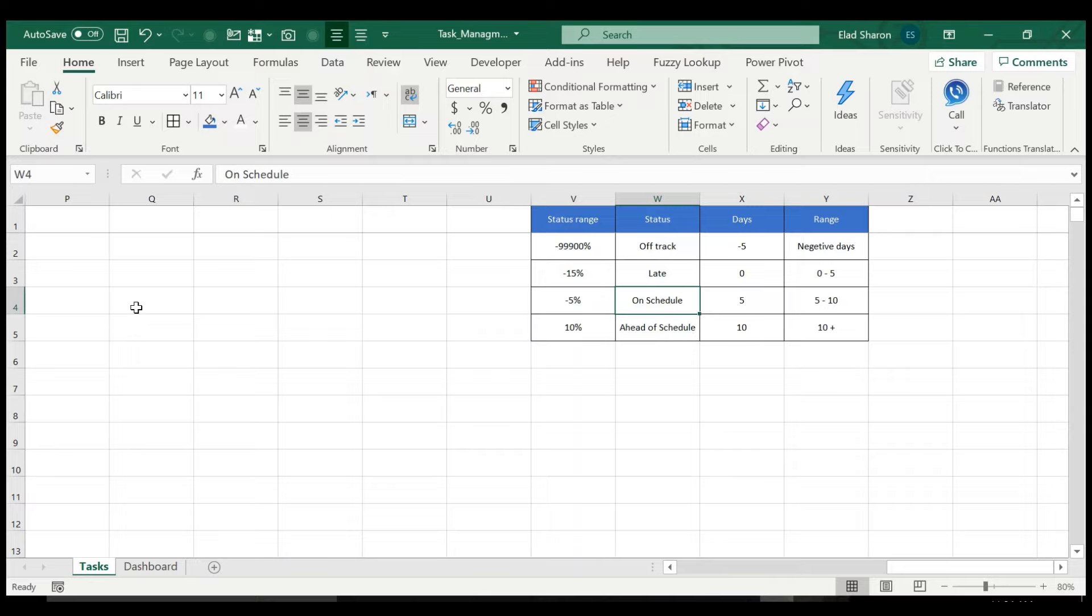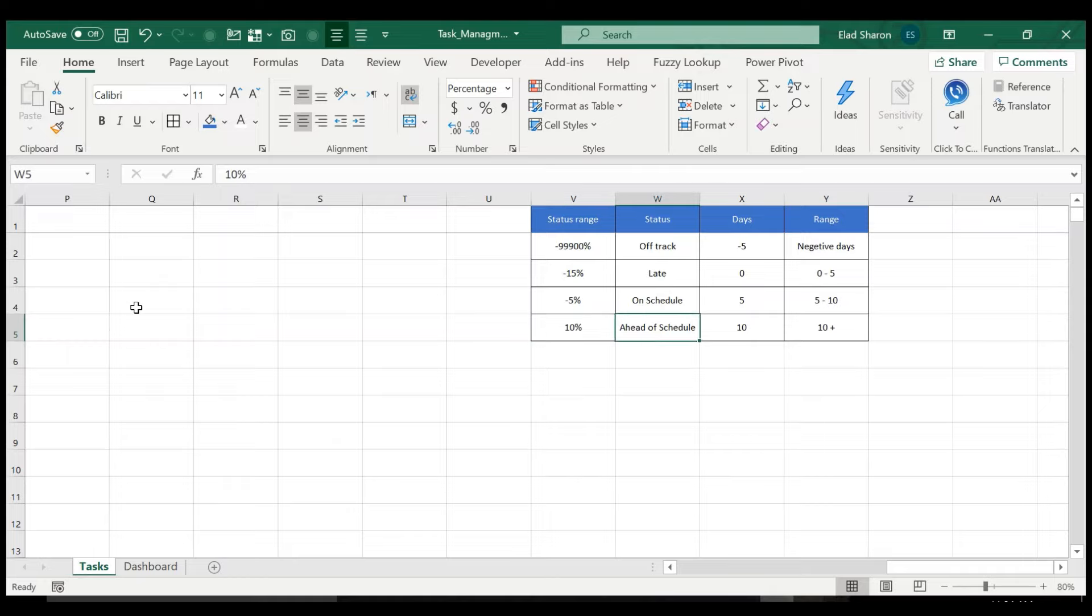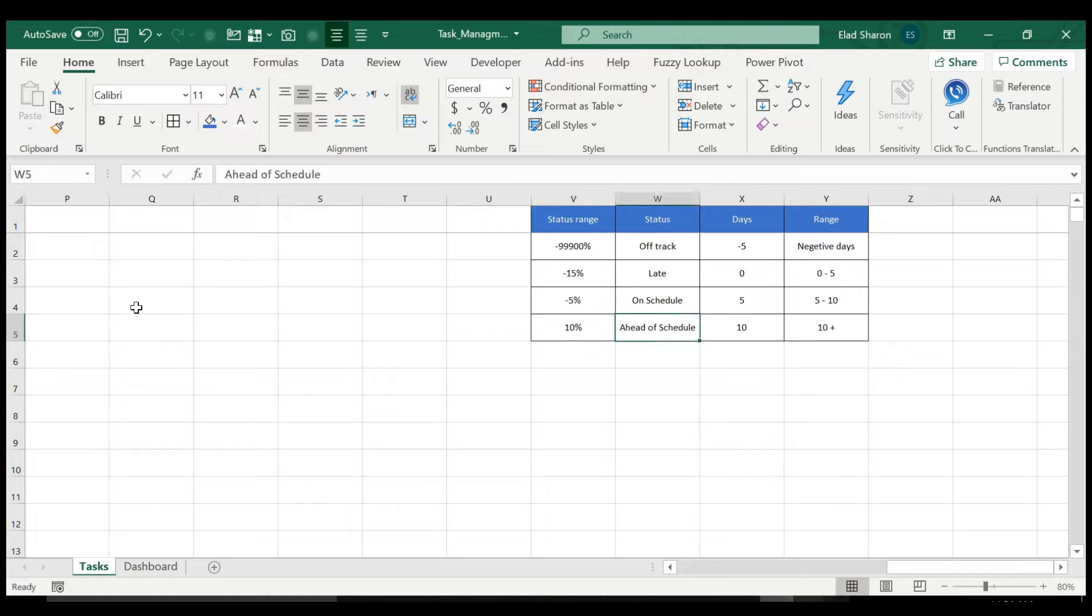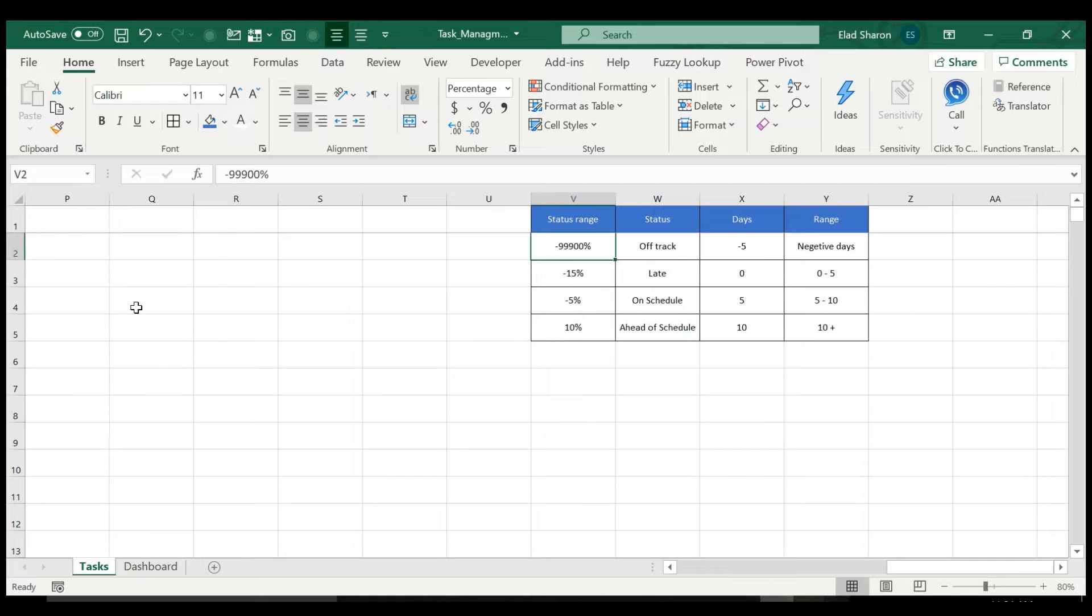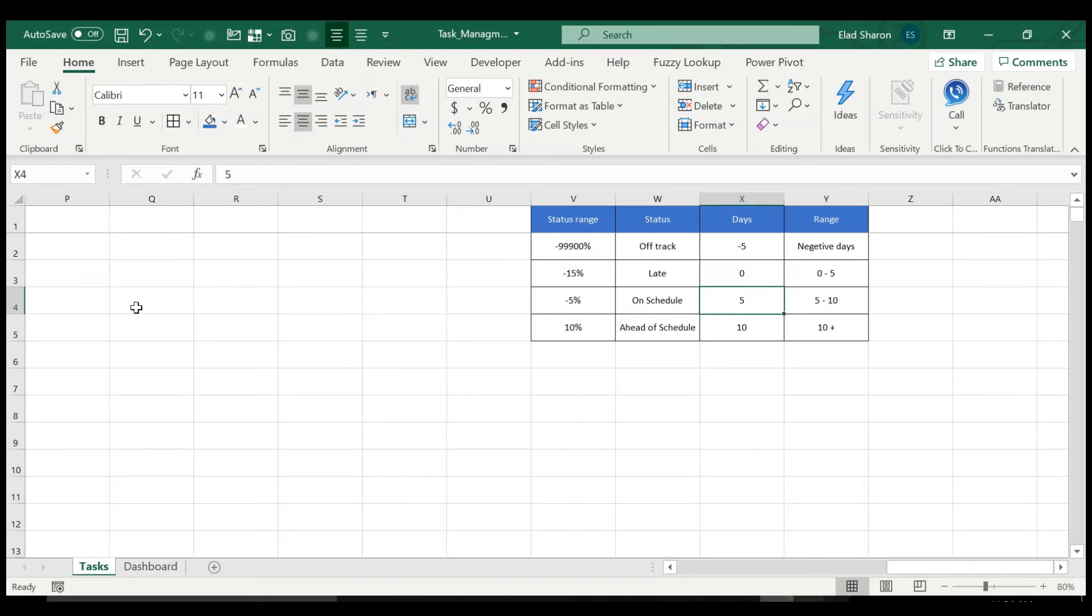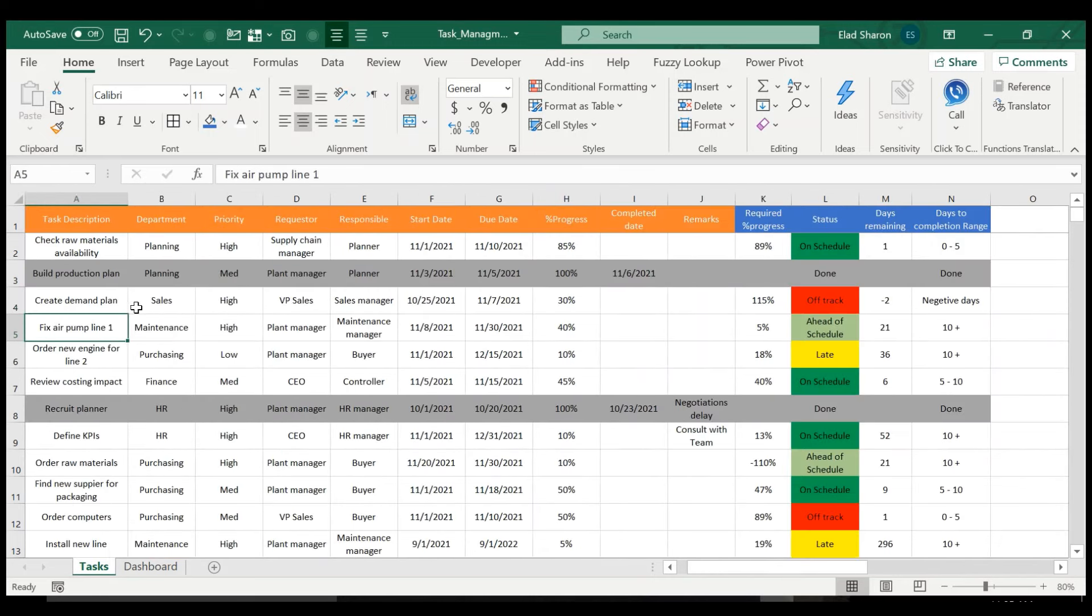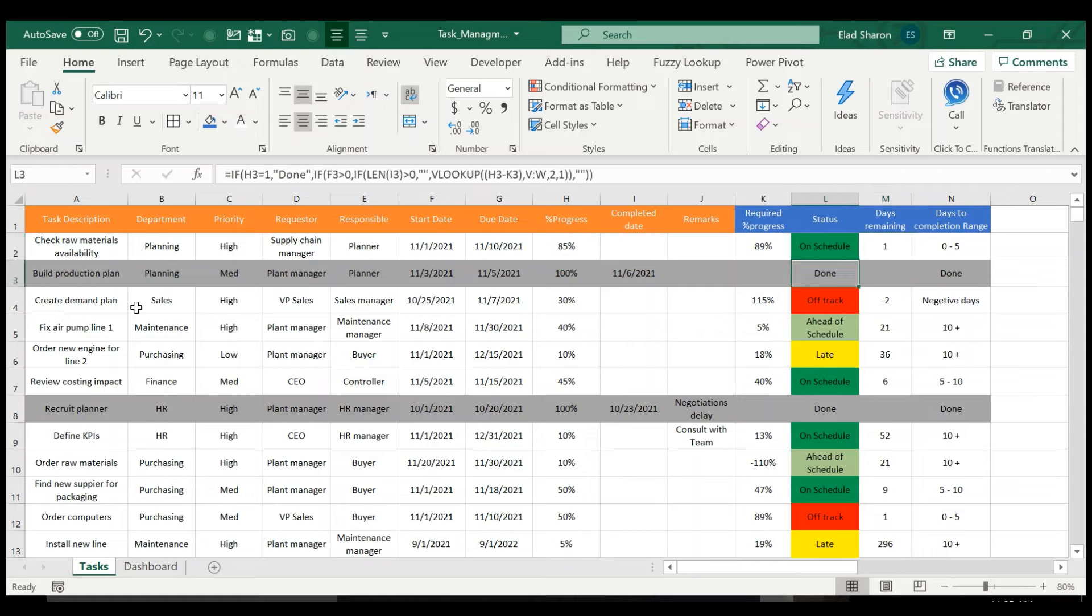If I'm 15% behind schedule, it's late. If I'm up to negative 5%, I'm on schedule. And between minus 5% to 10%, I'm on schedule. More than 10%, I'm ahead of schedule. You can change these numbers as you see fit and the description and the grouping will work automatically. You can even add more as long as it's sorted ascending. Same for days in the range. From my perspective, anything negative is negative days, between zero to five, five to 10, and 10 plus. So that's how you control these statuses and the days to completion.